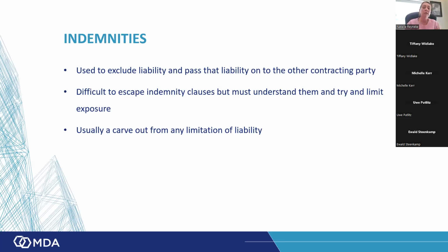I think doing it that way creates a more collaborative working relationship. When the employer simply says, listen, I'm aware, we all know that it's here, but I'm not taking any risk, he's not helping the situation. The contractor is going to add $1 million onto his price for, say, 2 months of delays.